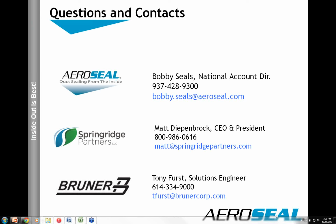We got a good question. We've got a couple of budgeting questions. Gretchen wanted to know who typically pays for this when it's a remediation problem. The owner, the ductwork subcontractor? Does it vary? I would say, this is Matt, I would say that it varies. If there's a specification issue, and it was maybe poor workmanship for some reason, and the owner and the engineer wanted it rectified, I would think that it would fall upon the contractor.